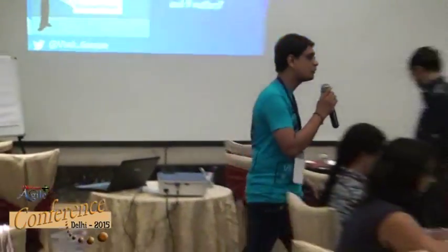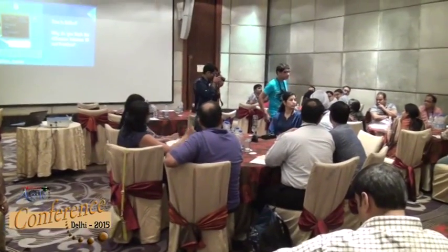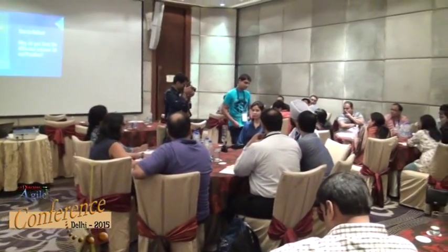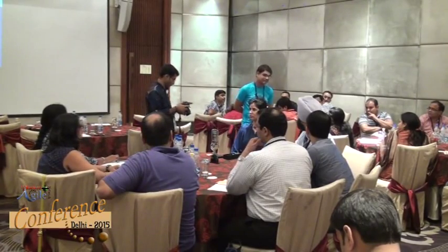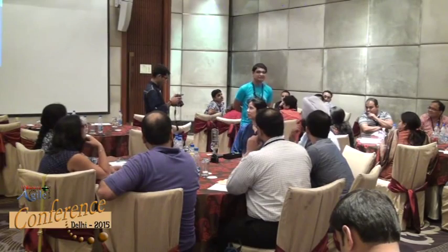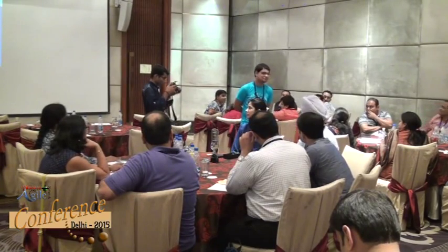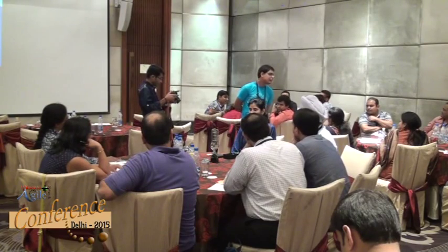Who wants to go next? I want to say one more thing here. Even we do not have 9 days because 4 hours will go in sprint planning. There will be 1 or 2 hours in sprint review and sprint retrospective. Nobody is considering that time. Yes. That is still okay, only 15 minutes for the other things we can't ignore.